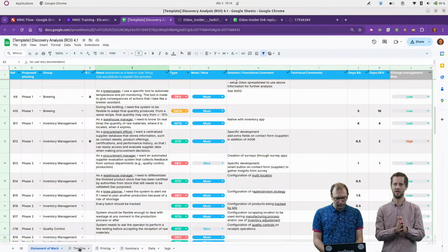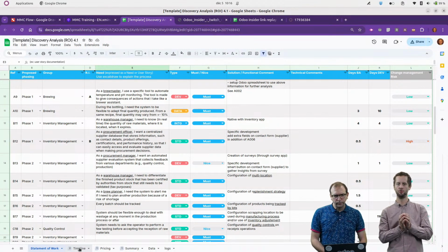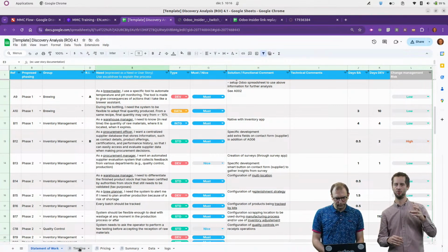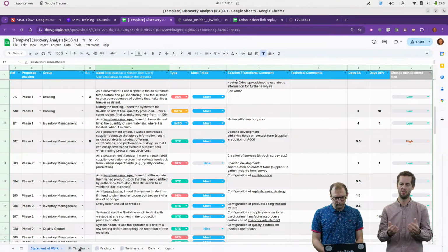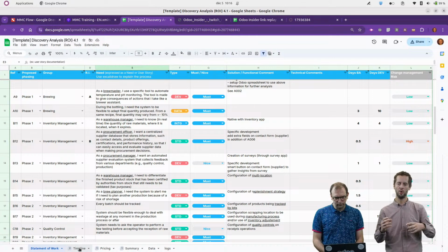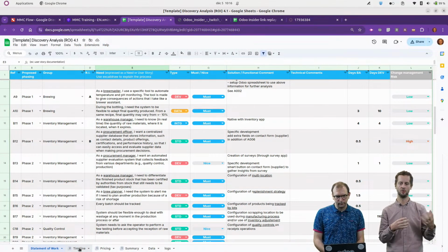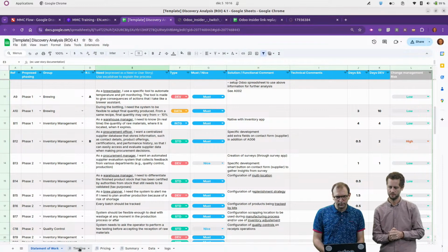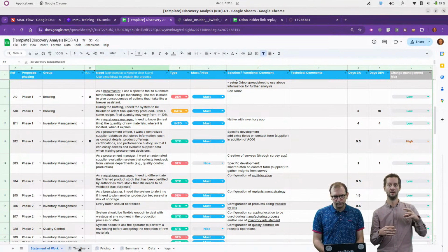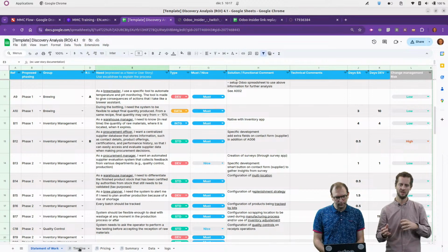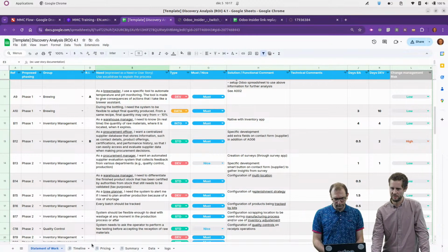Yeah, and here, we try to be visual and also to not have thousands of items, because the longer the list, the less chance we have that the client will go through them. So what we do is work with Excalidraw to provide visuals of the screens, to give a first overview of what the solution will look like. Or we also work with a proof of concept if the client is looking for additional information. That's the part where we customize the database a bit, and we see what we can do to clarify some of those aspects.